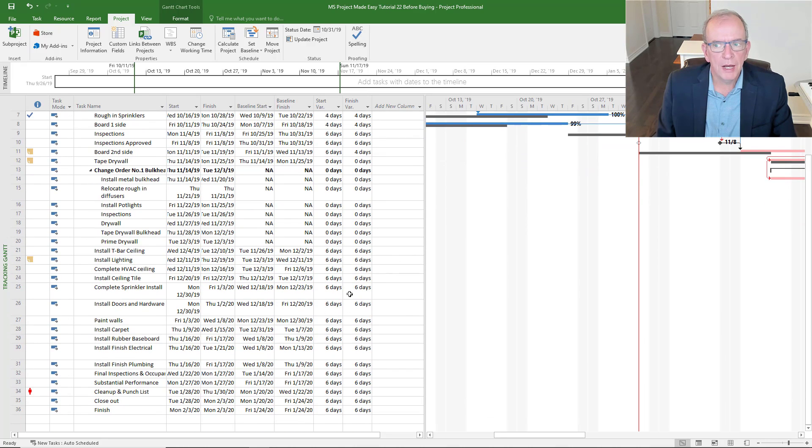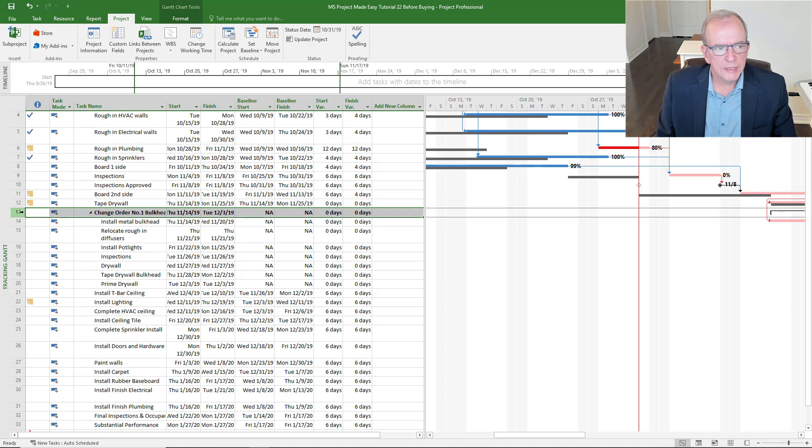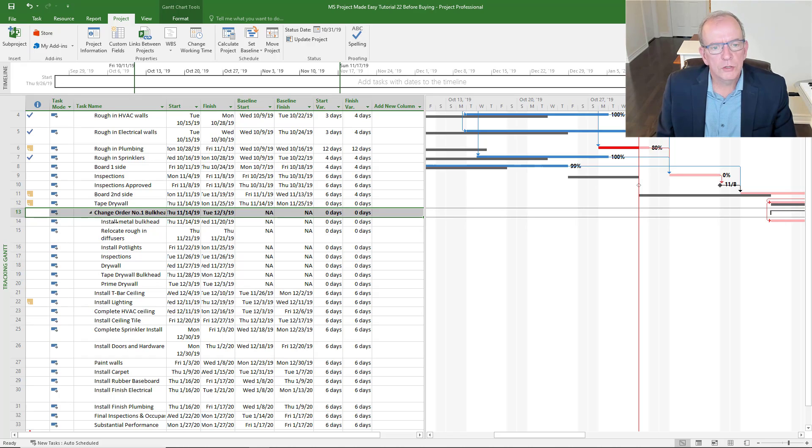We can compare how we're doing to the original project plan. So I can see that we're six days behind. If we have changes to the project - again, in Excel this becomes like a nightmare - I can insert changes and then I can see the impact that the change has on the project.